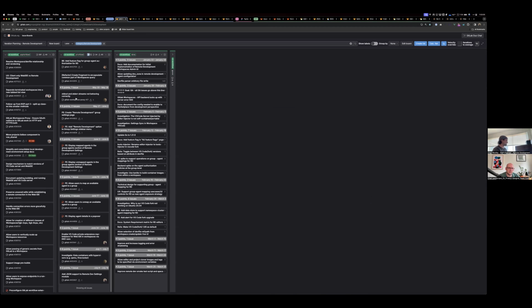The reality is we try to estimate, maybe a couple of months, 4 to 8, at least 8 iterations out, just so that we, probably ideally 1 to 3 releases. So 4 to 12 iterations out.